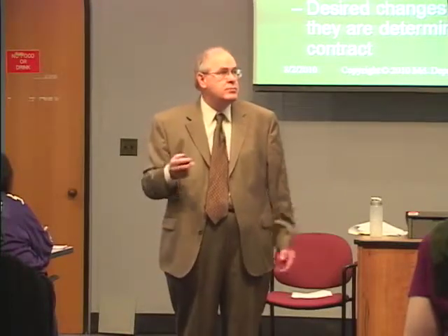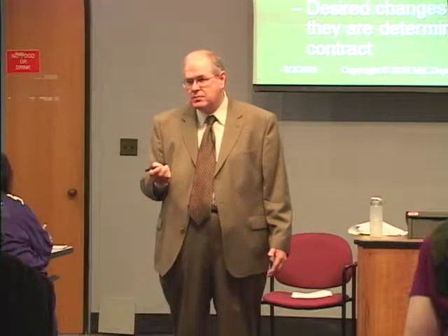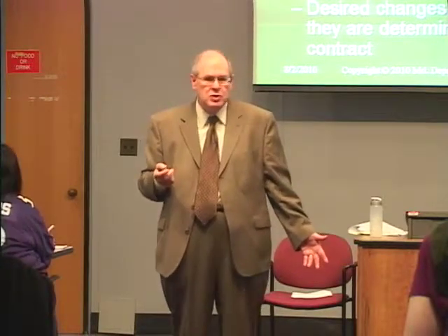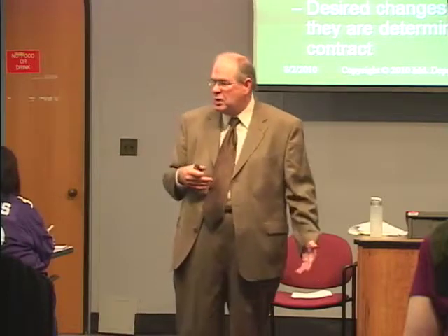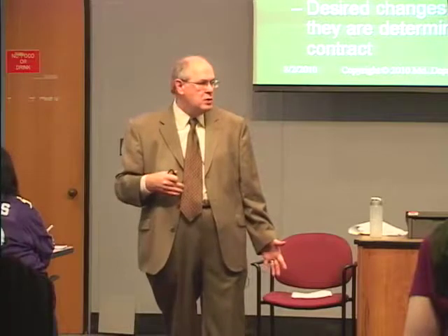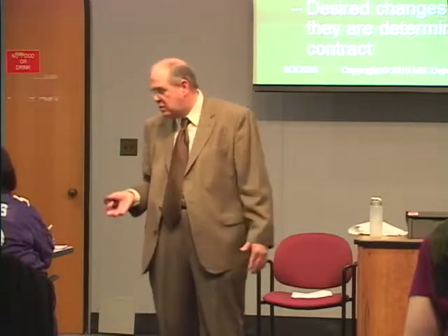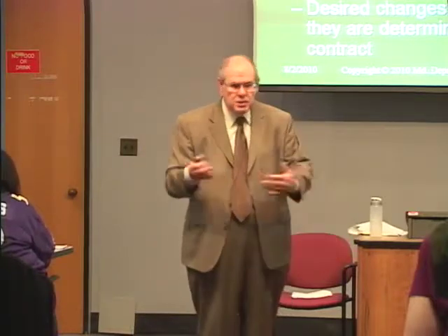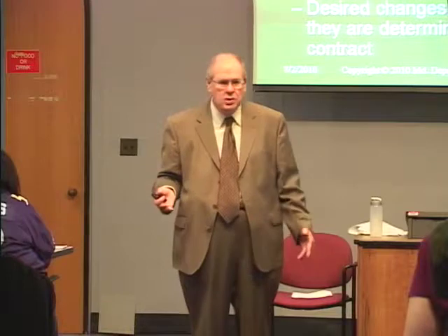And sometimes they are construed to be beyond the scope of the contract, and you can't do anything beyond the scope of the contract. And beyond the scope is a very nebulous term, and you have to have someone interpret what is in scope versus out of scope. You can modify a contract for an activity that is within scope. You are prohibited from modifying a contract to an activity that's outside the scope. And so sometimes that comes down to, is it or isn't it inside the scope of the contract?